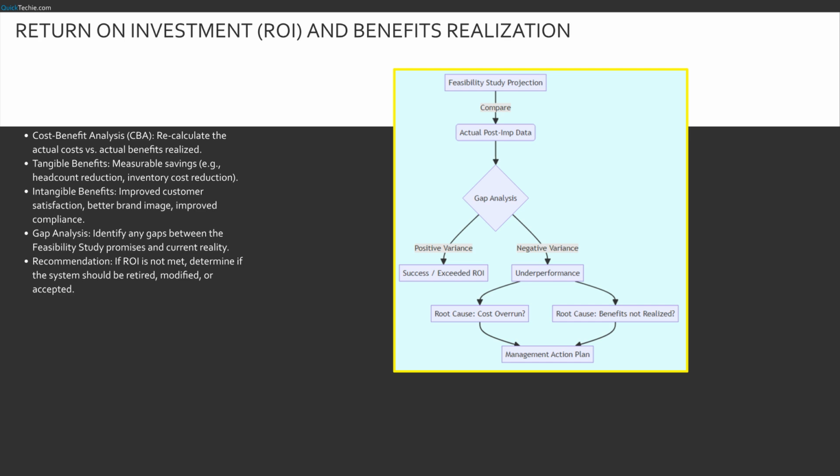If the project promised a 20% ROI and delivered 2%, that is a significant finding. We perform a gap analysis to understand why. The outcome of this analysis tells management whether to keep investing in the system, modify it to capture missing value, or in extreme cases, scrap it.